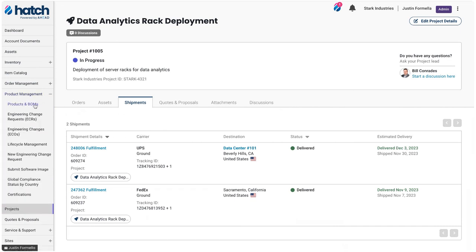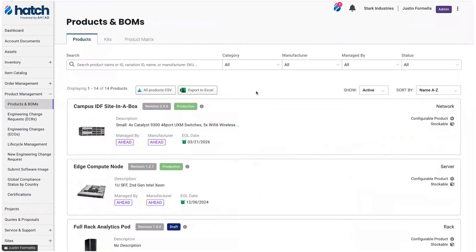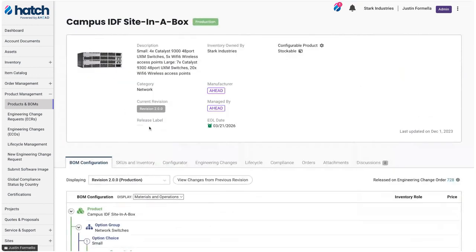The next area that's really interesting is we have functionality in which, in any kind of mass deployment, any deployment in which change control and repeatability is important, we can productize something and enforce change control. This comes up a lot. I've worked with one customer that had a large 1,400 store rollout. And they had a situation that somewhere through the multi-year deployment, there were changes that were introduced. And when they went to roll out new applications, they were surprised that over half the stores, half the sites, didn't match as they were expected.